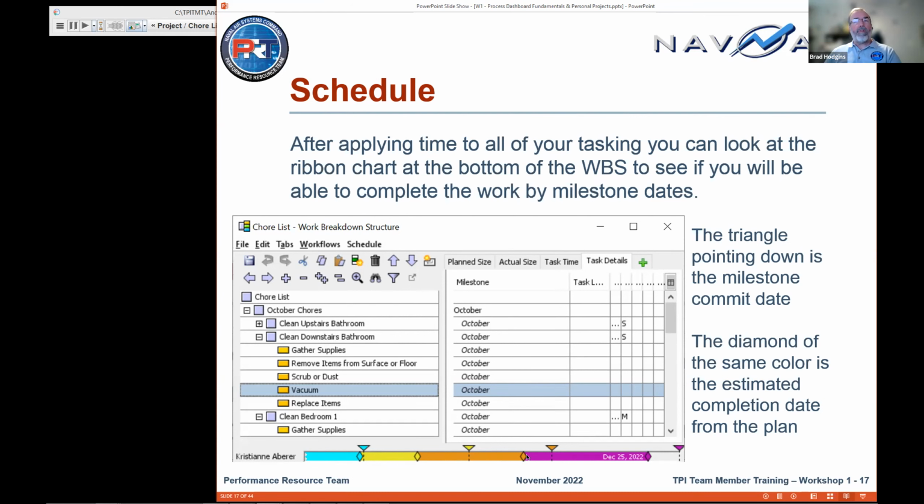And it's not that simple in the real world, but this is very helpful to prioritize in this way, because it can help you understand if you are not meeting this milestone, is it because you've got a ton of work on a previous milestone that's pushing all your work to the right? And it's not the problem with the work associated with this milestone, it's a problem associated with some previous milestone. Very, very valuable for load leveling your team to be able to meet commit dates along the way of your project.